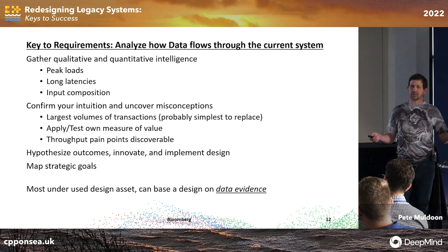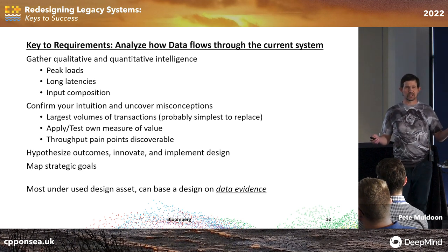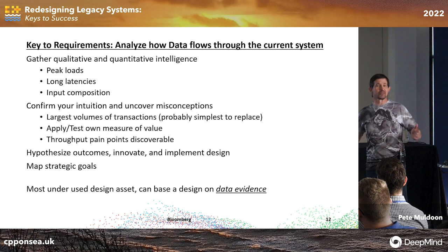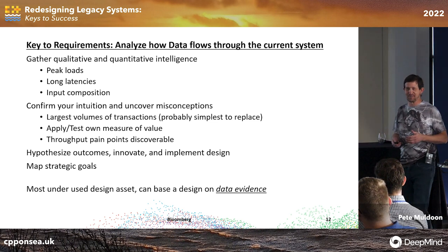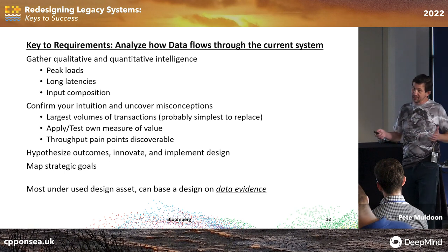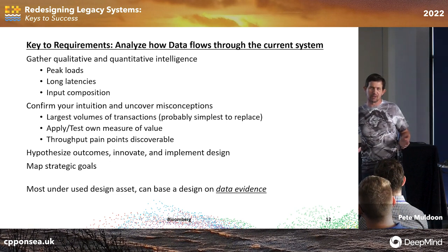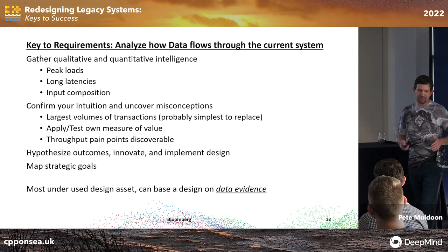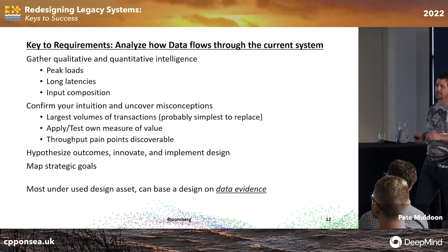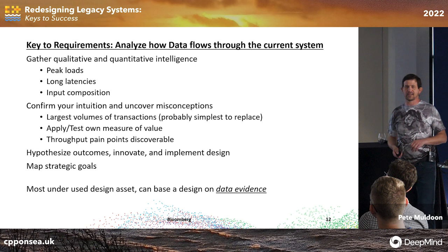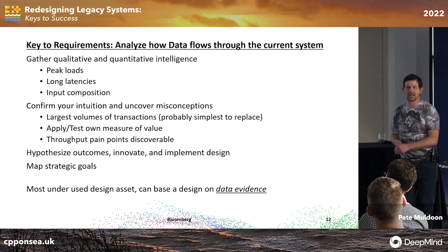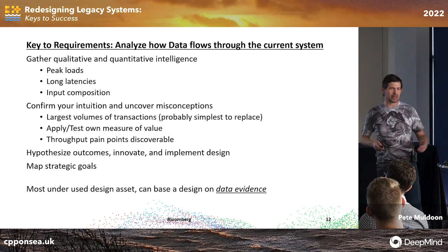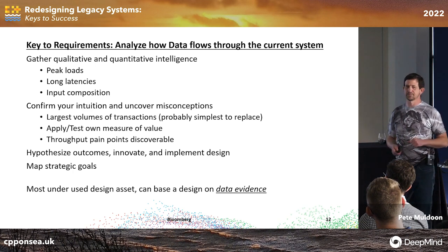Who thinks we should instrument the old code? All right. I don't know if you're shy, but you absolutely should instrument the legacy code. I've just spent a whole slide telling you that you need this information, or you might get lucky and solve the right problems, but you won't know it till the end. And that's far too late. So you do have to go back and instrument, and you have to allow for that in your timelines. Hey, this is the timeline, but I'm going to need a month maybe to instrument the code and then look at the data.